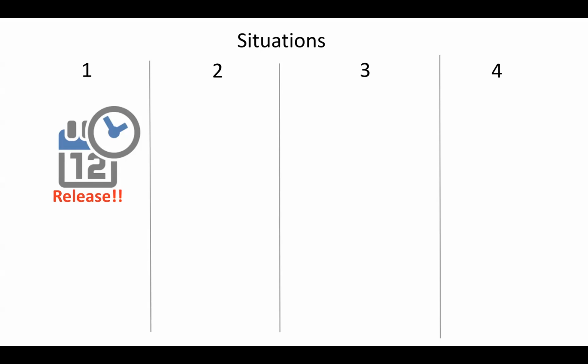The other option is that you treat this as a defect. You decide based on severity. If it is very high, you want to fix it before the release. And by the way, all the regression issues, they are automatic priority. They should not be sent as bugs or stories to the product backlog.